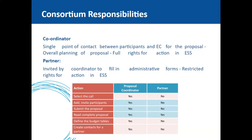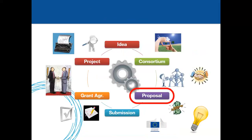The coordinator is the single point of contact between the participants and the European Commission. The coordinator selects the call, invites participants, submits the proposal, reads the complete proposal, defines the budget table, and creates the project context. As a partner, you must read the complete proposal and provide further inputs that the coordinator requests.